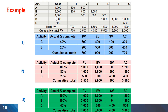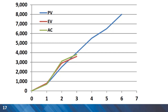In another example, actual cost is given. I encourage you to pause the video and calculate cost variances as the difference between earned value and actual cost. The cumulative total values can then be used to plot the three curves for this project.